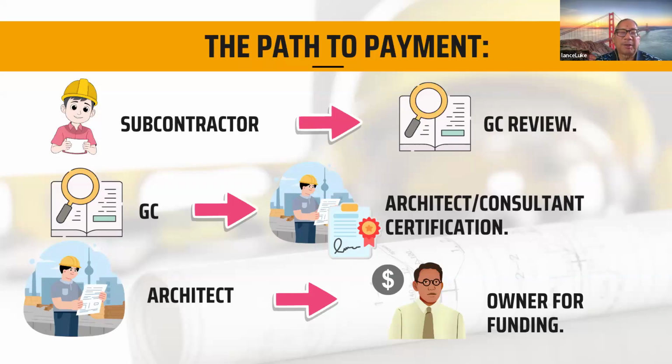Sometimes there's a delay between subcontractors submitting their invoice to the general contractor, or there's a delay when the general contractor gets all the paperwork to submit to the architect or construction manager. And then after that, there could be a delay on the architect submitting the pay application to the owner after the architect approves it, to get paid. So this whole process may take